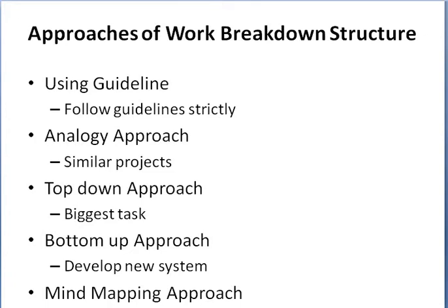Then the cost for entire project must be calculated by adding the cost of all the lower level work breakdown tasks. So when Department of Defense personnel evaluate cost proposals, they must compare the contractor's cost with the Department of Defense estimates, and if it observes large variations, then it will not be acceptable. We need to redesign, reformulate the task. Then second is analogy approach.